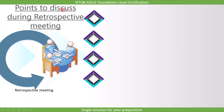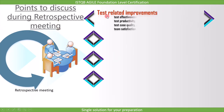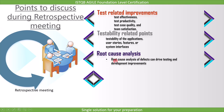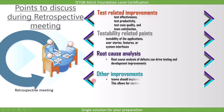Let's see some examples of improvement decisions we can discuss in a retrospective meeting. We can focus on test-related improvements such as test effectiveness, test productivity, test case quality, and team satisfaction. We can also discuss testability of the applications, user stories, features, or system interfaces. The next point is root cause analysis — root cause analysis of defects can drive testing and development improvements. Teams should implement only a few improvements per iteration, which allows for continuous improvement at a sustained pace.